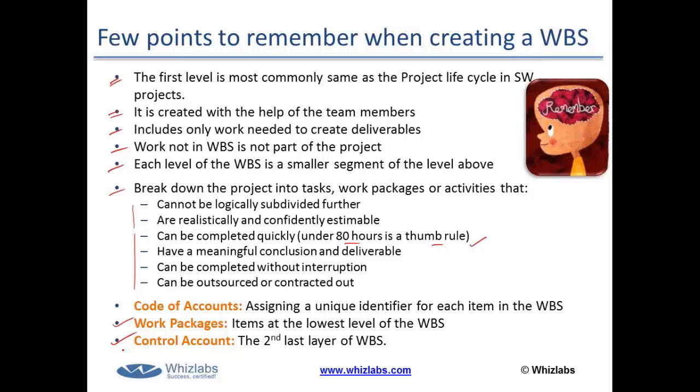You might like to do the costing, budgeting, planning, estimation, etc. at a little bit higher level than the work packages. That layer, maybe the second last layer of the WBS, or maybe a couple of layers higher than the work packages, is considered the control account.